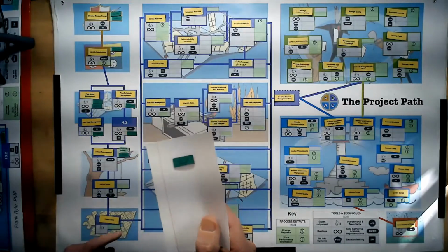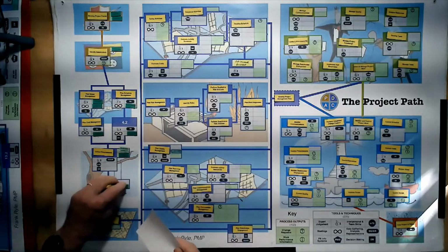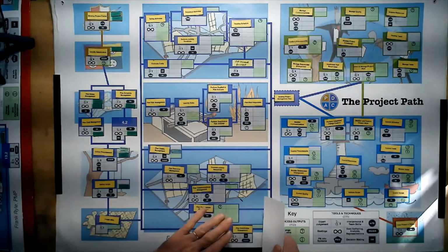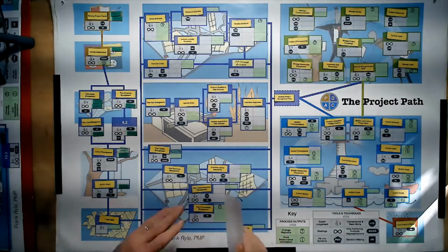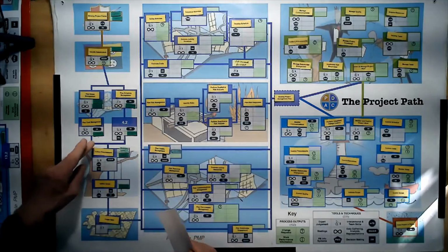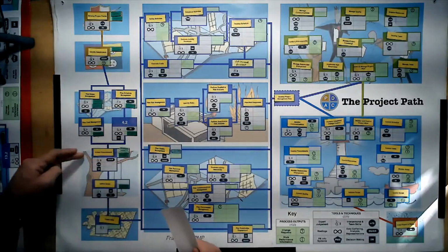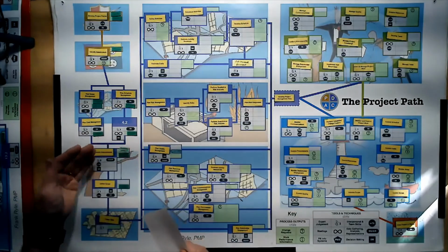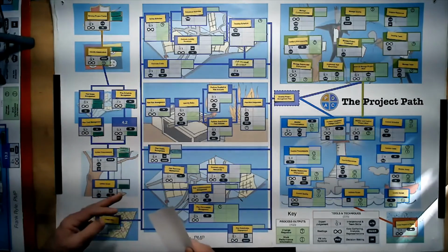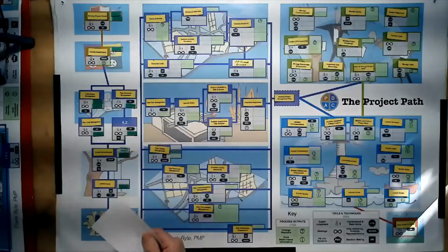Important one for you to know, the scope statement. So the scope statement is a strong PMBOK deliverable. It's the project scope statement, not the statement of work, which is under contract with a vendor. But we have the scope statement here, comes out of this one, define the scope. So collect the requirements is all the requirements, whether they're in, they're out. And define the scope tells us which ones are in. It might also give assumptions and constraints as well.